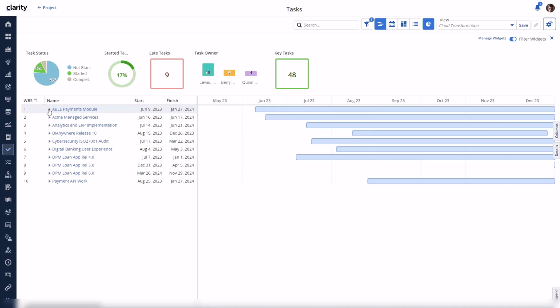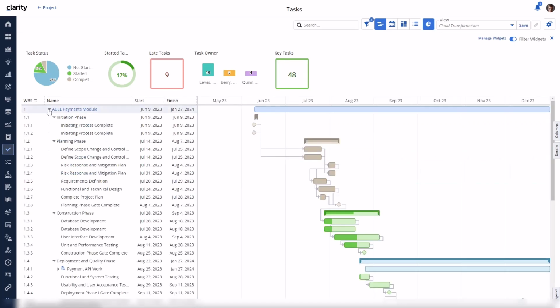This row is referred to as the investment grouping row. This grouping row won't have any information shown in the details flyout. The first column displays a dynamic row number or WBS number. It has no relationship to the actual WBS sort order of the tasks and is only available as a fixed column in the timeline. It is important to understand that this number is dynamic and will change based on the rows that are currently listed in the timeline. It's used to identify relationships between the tasks when viewing and managing dependencies.